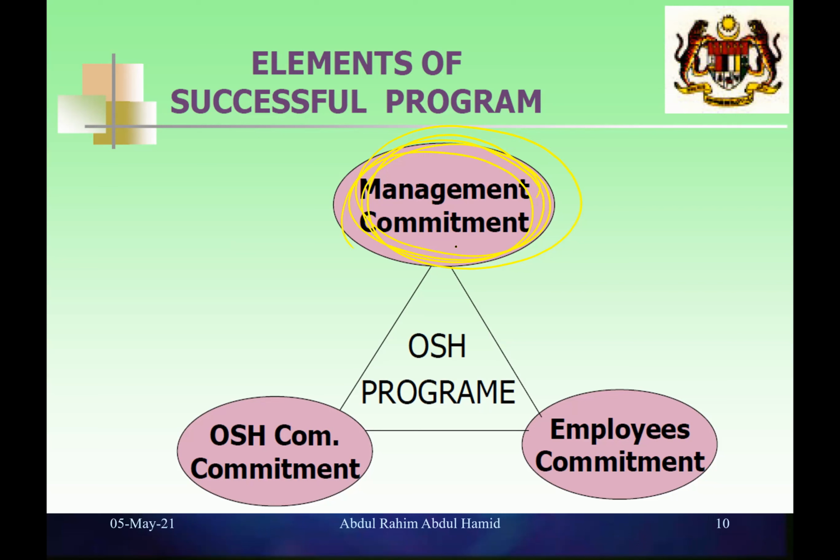Okay, by right they should be spelled out clearly, so the contractor can come up with the costing, and they can be held responsible if they do not comply with those things, and if they do not implement those things, then no money will be paid to them. Okay, that should be the concept.